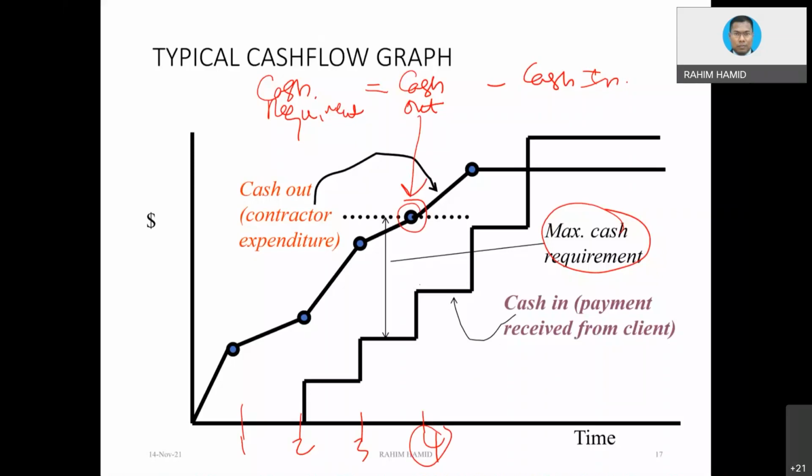Are you going to take this? It looks like at the end of the fourth month, you are going to receive the money here. But you are not going to take this value. No, if you do that, you are going to get the answer as the differences between this point and this point only, which is not much. Whereas the contractor has been suffering the whole month while waiting to get the money on the 31st of April, whatever. So which one is much more critical?